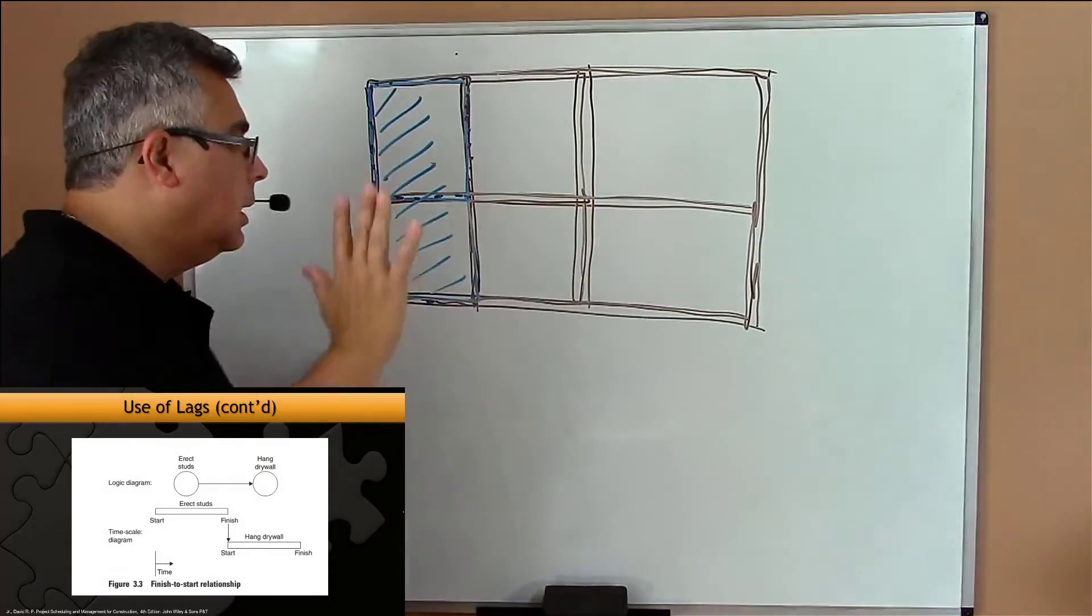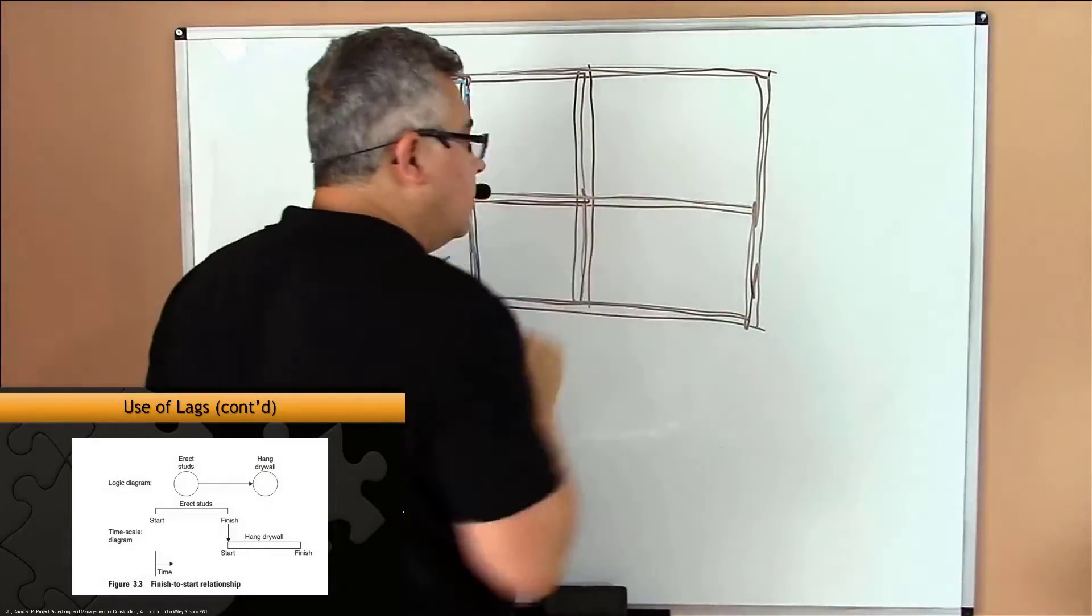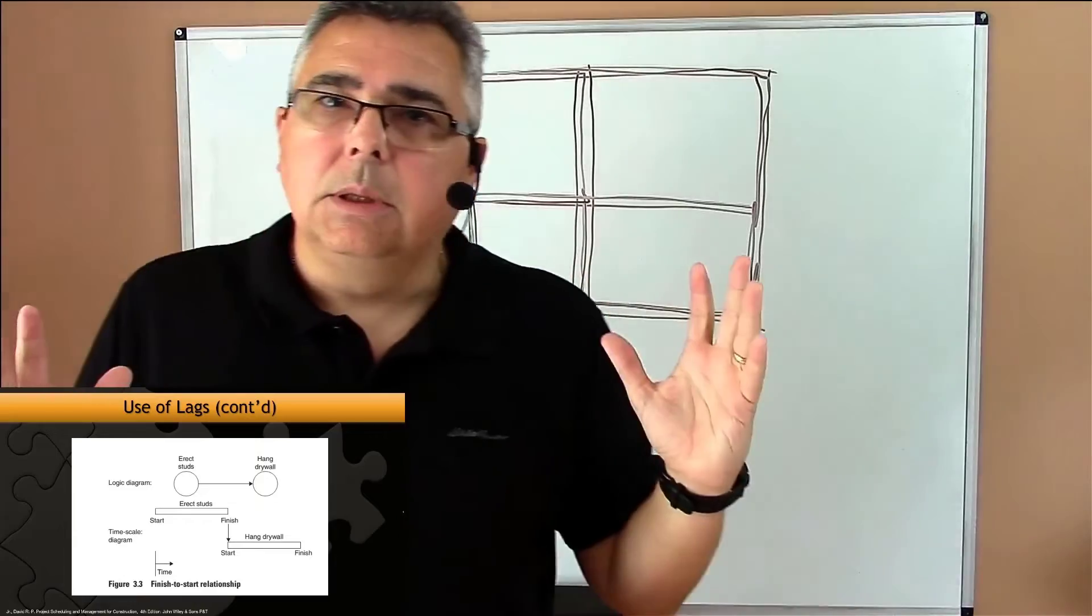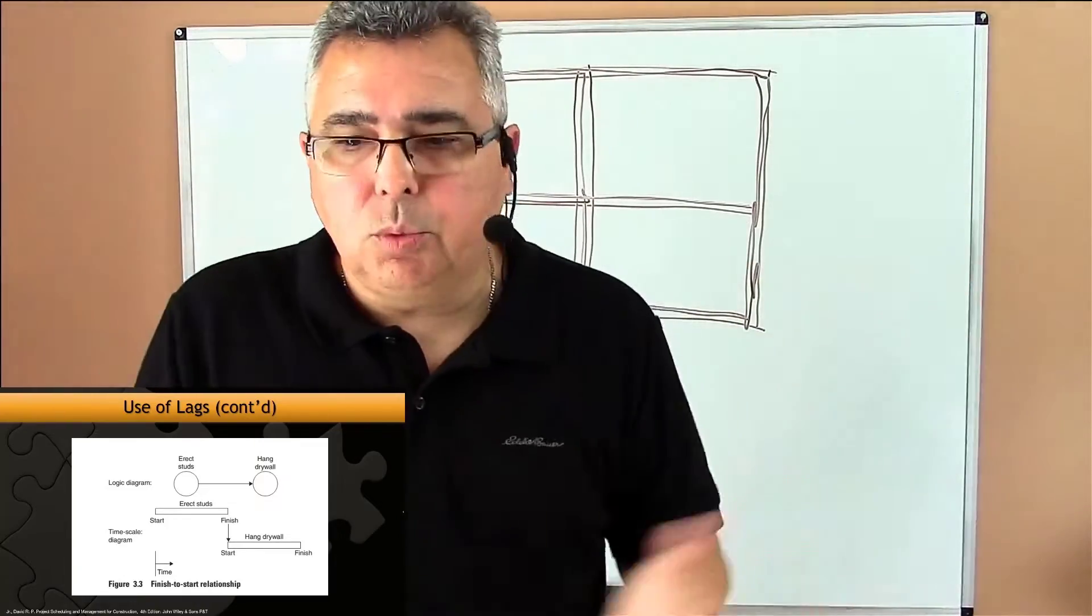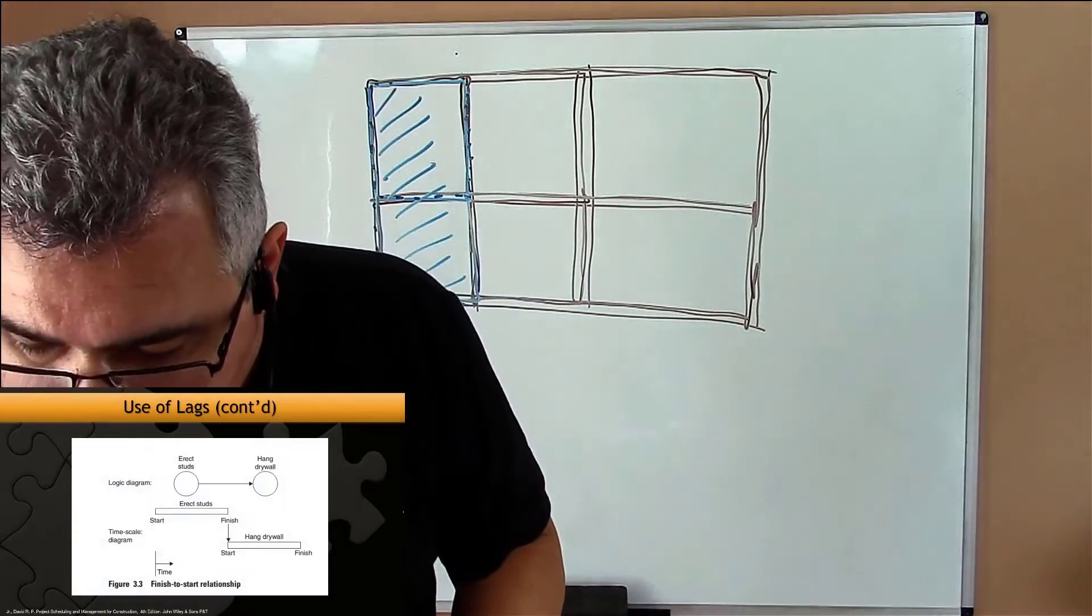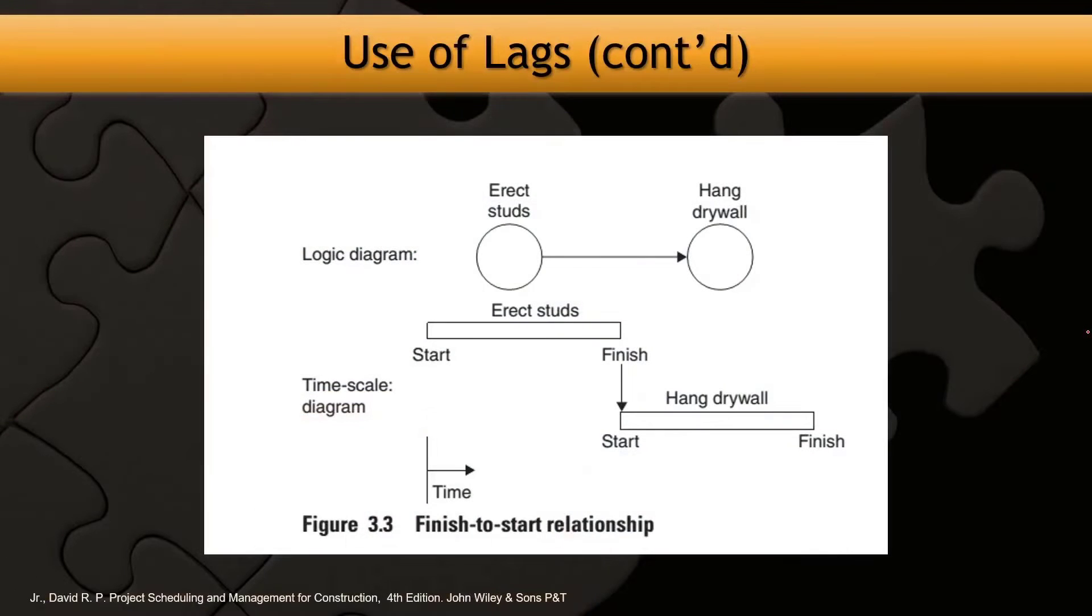And then you start hanging the drywall. That's one way. Does it work? Yeah, it works. The problem here is that you may take a long time, so you may have to analyze some situations in which you may consider overlapping a little bit.